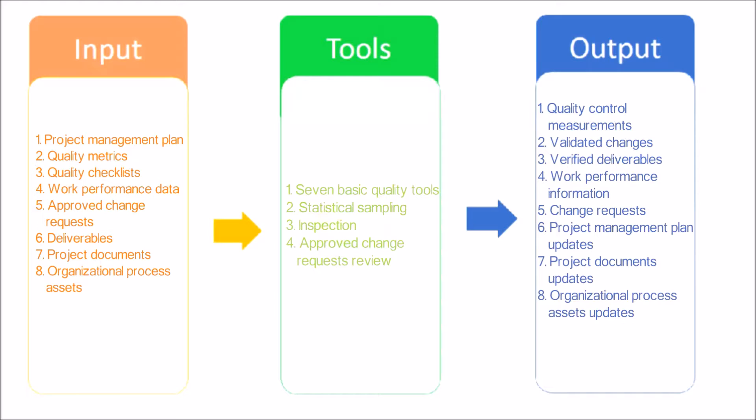Validated Changes: Any changed or repaired items are inspected and will be either accepted or rejected before notification of the decision is provided. Verified Deliverables: A goal of the Control Quality Process is to determine the correctness of deliverables.